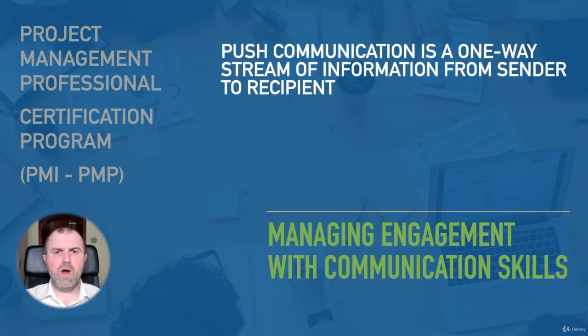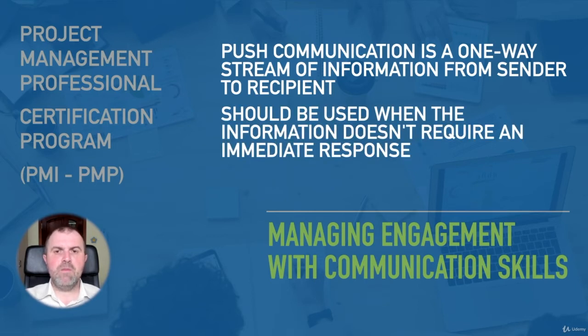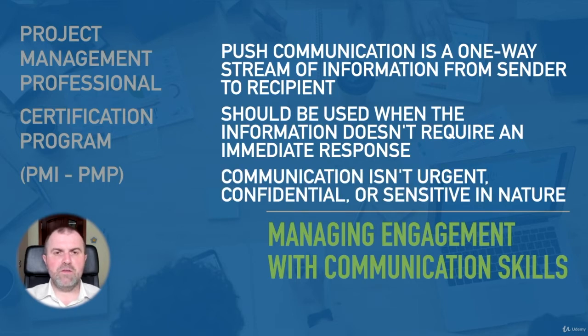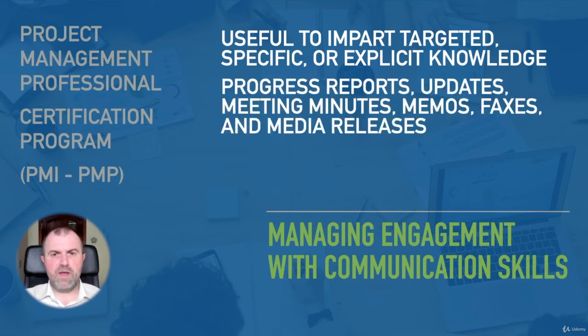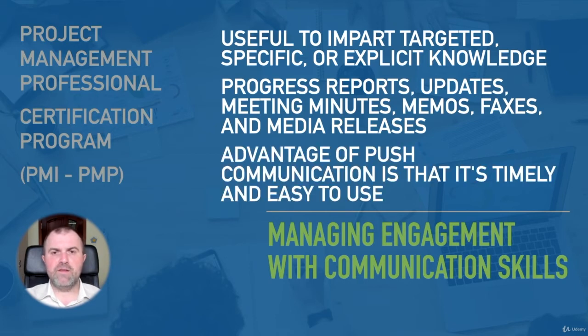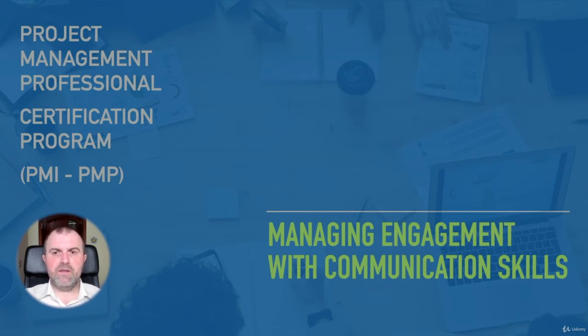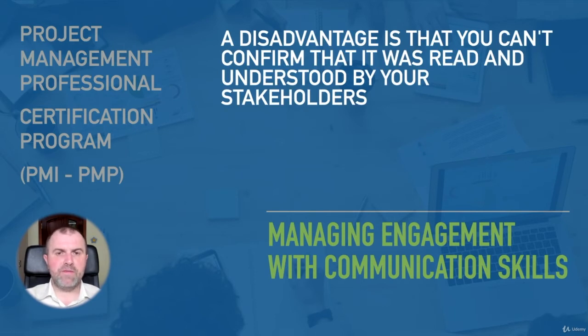Push communication is a one-way stream of information from sender to recipient. Push communication should be used when the information doesn't require an immediate response and the communication isn't urgent, confidential, or sensitive in nature. It's useful to import targeted, specific, or explicit knowledge, such as that in progress reports, updates, meeting minutes, memos, faxes, and media releases. An advantage of push communication is that it is timely and easy to use. A disadvantage is that while you can confirm your message was sent, you can't confirm that it was read and understood by your stakeholders.